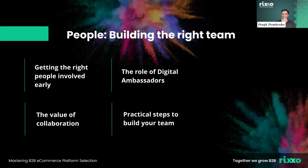I would say it's really key to get the right people involved early. So sitting down and doing that analysis of who you need to bring into the team is super important. It needs to be well balanced. You need to have a generalist expert, is what we like to say, who's that product owner, who sees the long-term strategy and is working mainly on the business needs and requirements, and then supplement that with subject matter experts that can come in and really focus on the technical elements or the key details of your requirements and the expertise that you need in order to create that documentation.